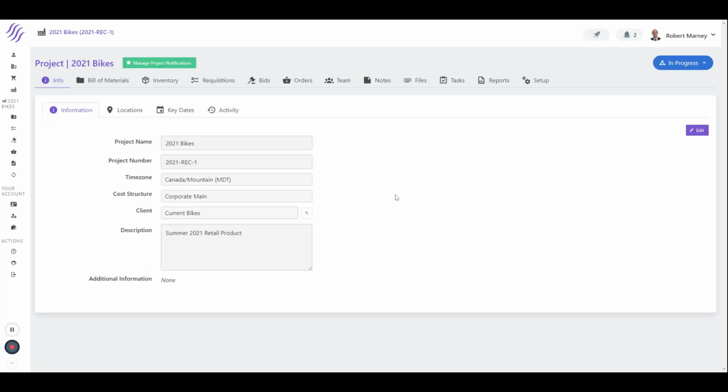So, this is from a retail perspective. We're starting to manufacture 18 months out, and we need to move from the engineering design data by our design teams and go all the way through the process of competitive bidding and then ordering and moving raw materials through different fabrication and then ultimately down to our retail locations.